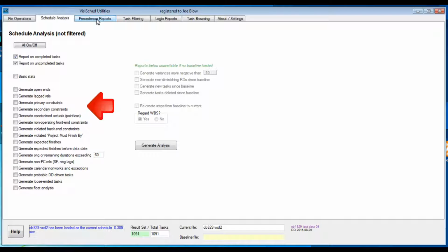The first way is by quality diagnostic checks in the left column, many of which are not in P6 or Project. The second way is the top right column if a baseline is loaded. VU can provide variance reporting and task comparisons. The third way reports the evolution of the schedule from the baseline to the current, useful in merging schedules and